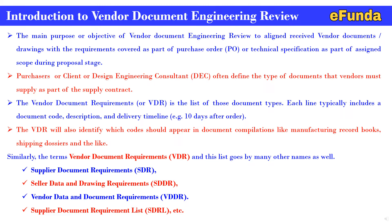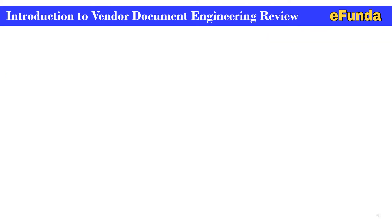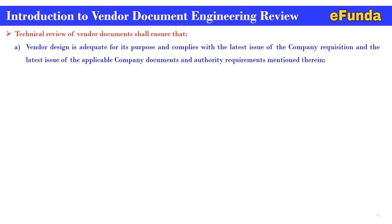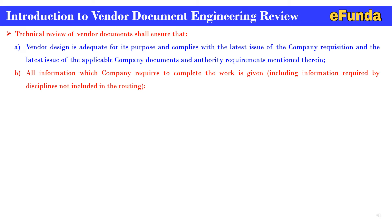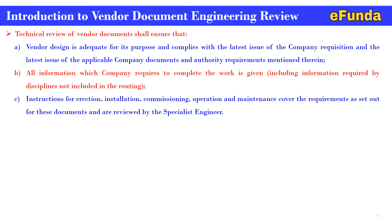Vendor document submission is covered in this video. The technical review of vendor documents shall ensure that the vendor design is adequate for its purpose and complies with the latest issue of the company requisition, applicable company documents, and authority requirements mentioned in the specification. It also ensures that all information the company requires to complete the work is given, including information required by disciplines not included in the routine, and that instructions for erection, installation, commissioning, operation, and maintenance cover the requirements.